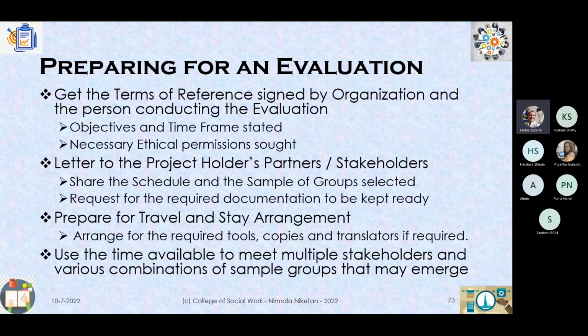And of course, you may add other things which are not written in the slide. Like for example, you can give an entire schedule. I think I'm coming to the next point. So you write a letter to the project holder, partners, or the stakeholders, and share the schedule and the sample of the group selected. Request for the required documentation to be kept ready.